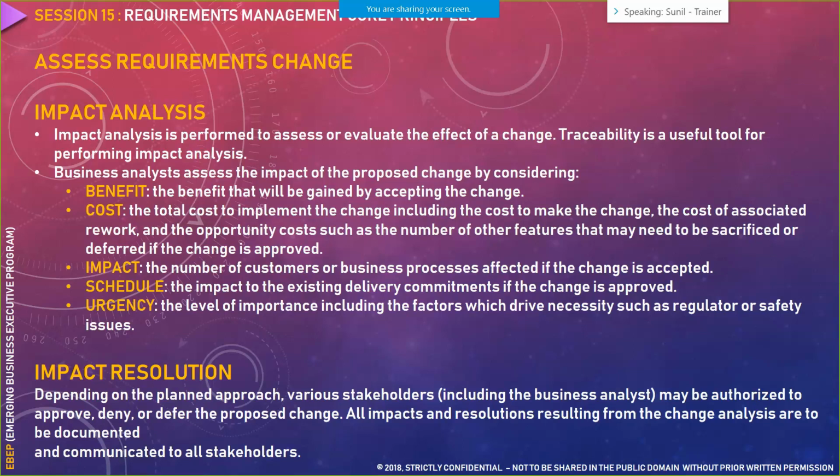For example, depending on the planned approach, various stakeholders, which also include business analysts, may be authorized to approve, deny, or defer the proposed change. So all impacts and resolution resulting from the change analysis are to be documented and communicated to all the stakeholders. Whatever your resolution is based on your impact analysis needs to undergo a formal round of approval. Based on everyone's agreement, whether they approve or deny it, you go about incorporating this particular change.